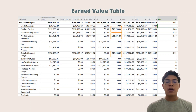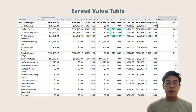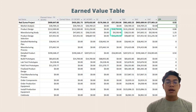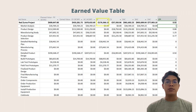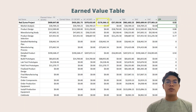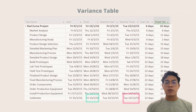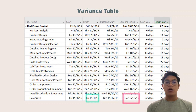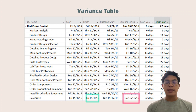Despite the three cost overruns, there is one task that is under budget — the manufacturing studies — highlighted in green. Overall, as of 8th July 2015, the Red Zuma project has a remaining cost of approximately $176,366 to complete. The project is about 47.9% completed and, based on the variance table, is projected to finish on Friday 15th January 2016 — approximately 22 days late from the original schedule.